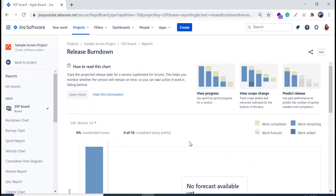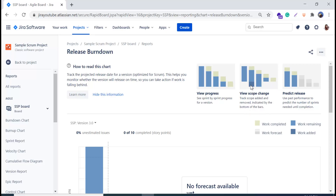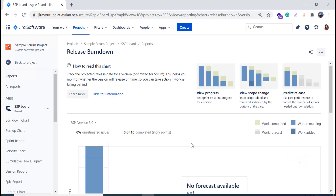Here we are, and this page looks just like our sample release burndown chart. We have information about how to read the chart and a description: it tracks the projected release date for a version and helps you monitor whether the version will release on time so you can take action if work is falling behind. On the left side you can see 'View Progress' to check sprint-by-sprint progress for a version, and 'View the Scope Change' to track scope added and removed — the dark blue area represents scope added. You can also use past performance to predict the number of sprints needed until completion.